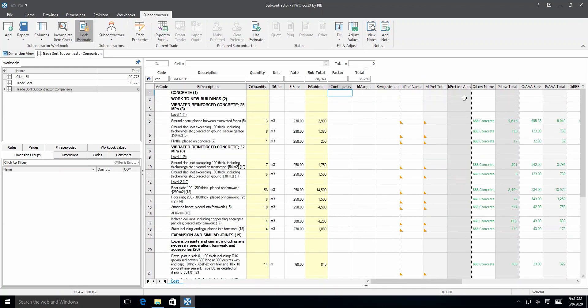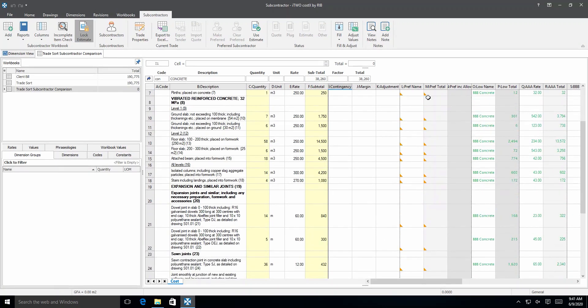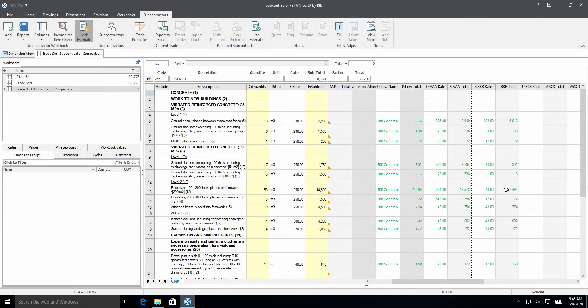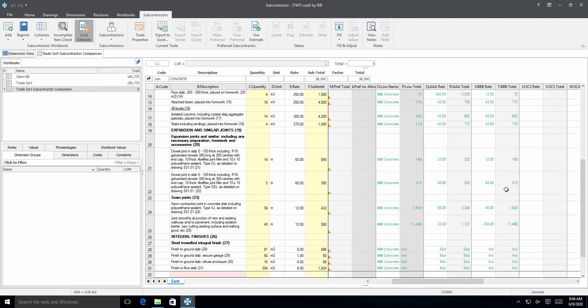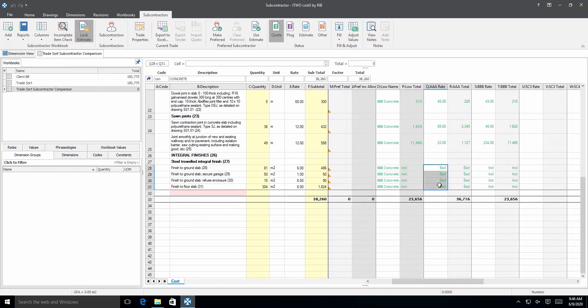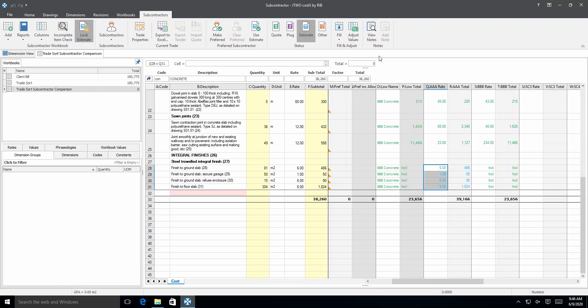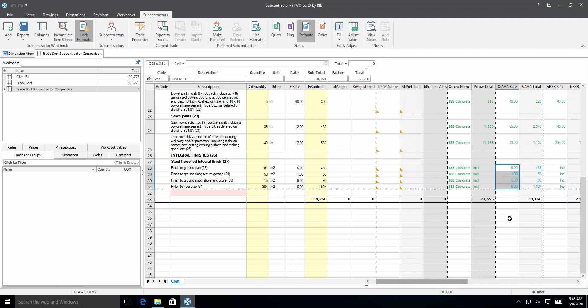When determining the total of a subcontractor comparison workbook, i2 CostX will calculate the preferred total including allowances for a more accurate figure. Once a price has been entered, we can select the subcontractor for the item as preferred, regardless of whether the price is the lowest, in order to arrive at a tender price. However, adjustments may need to be made to the pricing to ensure that the comparison is on a like-for-like basis. We'll now select the four cells and delete the content, as the estimate pricing can be used to price items excluded from the first subcontractor's tender. Then from the drop-down menu of the Fill button, choose Fill from Estimate. The estimate rate will be inserted into the cells with the color of the numbers changed to blue, which indicates the use of an estimate rate.